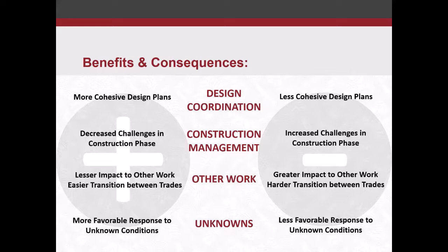Construction management: a good thorough design can help assist the construction manager in phasing, scheduling, detailing, and getting the work done with a lot fewer challenges and obstacles. Whereas if it's not as thorough, they may have more RFIs to deal with, more potential change orders, which makes it a little bit more of a nightmare to work with.